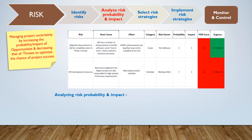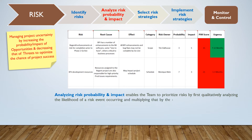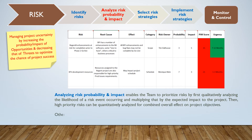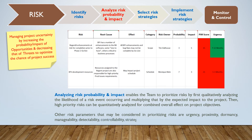Analyzing risk probability and impact enables the team to prioritize risks by first qualitatively analyzing the likelihood of a risk event occurring and multiplying that by the expected impact on the project. High priority risks can then be quantitatively analyzed for their combined overall effect on project objectives. Other risk parameters that may be considered in prioritizing risks are urgency, proximity, dormancy, manageability, detectability, controllability, strategic impact, and propinquity.